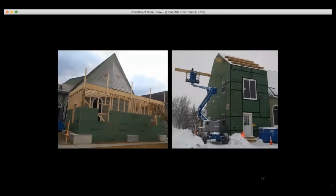Since the mural was painted on a plaster on lath ceiling attached to the inside of the rafters that supported the slate roof, the entire apse roof structure would have to be removed in one piece. A protective structure had to be built around the apse before work could begin to remove the slate roof and sheathing to open the mural from the back. The protective structure was minimally heated to allow the construction of a steel support structure around the mural over the winter.